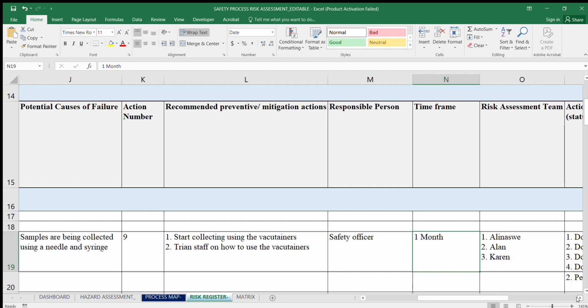And if you do not have the money, it takes even longer, because you need to lobby for some funds. So lobbying, then procurement, then implementing and training people on that item will take longer, therefore your time frame may span from 1 month to a year, or 1 month to 6 months or 3 months, depending on how complex or how expensive that item is.